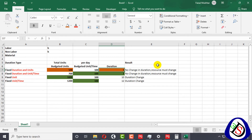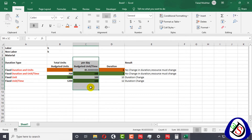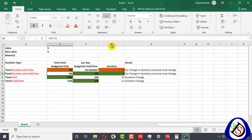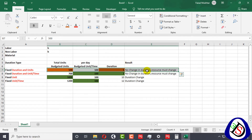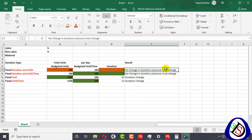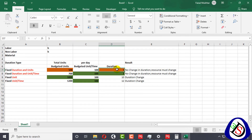When you change the duration, you can see that units per time — the working capacity — decreases. In Fixed Duration and Units, when you change the duration, the budgeted units per time will vary; it may increase or decrease. The result shows no change in duration, and the resource may change, but duration cannot change and budgeted units cannot change — only budgeted units per time will vary.